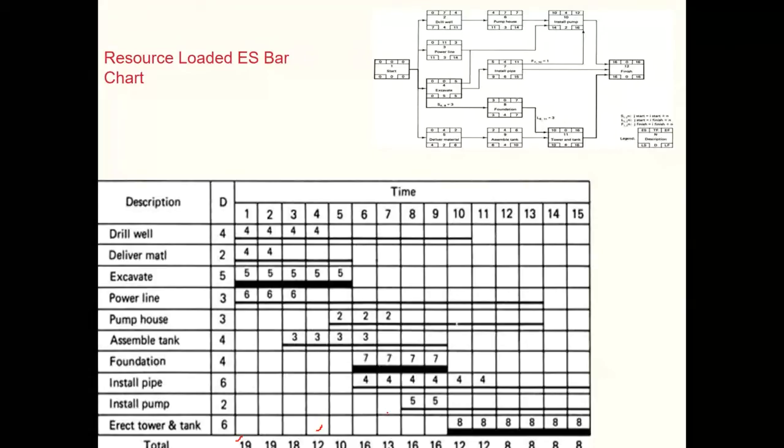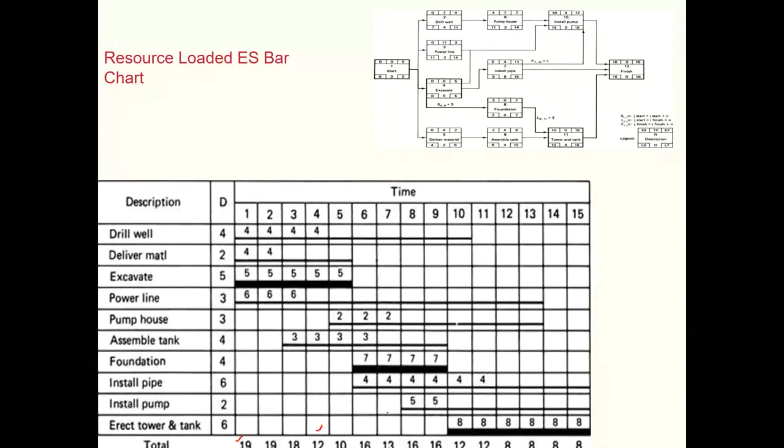And this is not good while dealing with our teams. We cannot hire and fire people at random. Rather, the preference would be to continue to work with the given group of people for the longest amount of time possible, and to keep them busy. So we can make use of the knowledge of a float. So for instance, here we can see there's plenty of good slack available. So possibly using this information to get a little bit smoother profile.